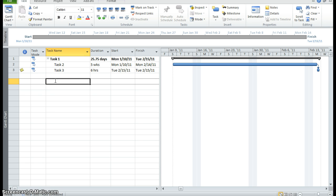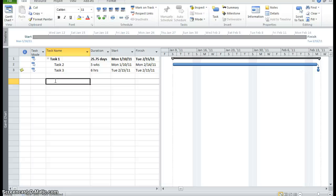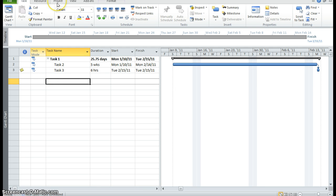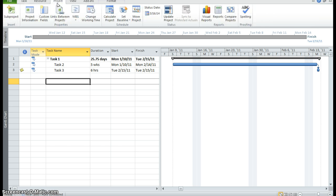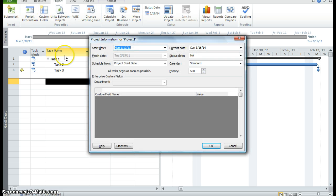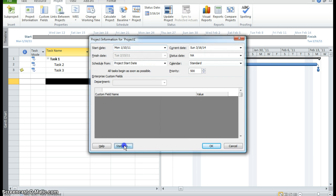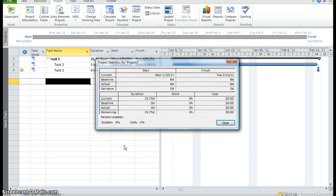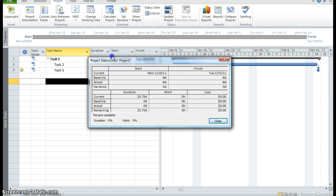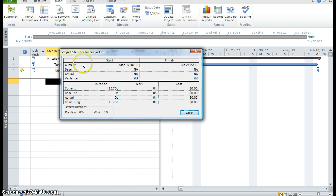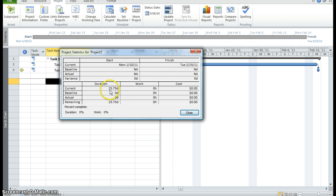Now what I want to do is I want to check the project duration. So I'm dealing with the project. So I'm going to go to the project tab. I want to check the project duration. So I'm going to the properties group and I'm clicking on project information. I'm going down to my statistics command, clicking on statistics and it tells me the start of my project is 1, 10, 11 and the finish is 2, 15, 11. And it tells me the duration is 25.75 days. Right now it has no cost and we haven't started work.